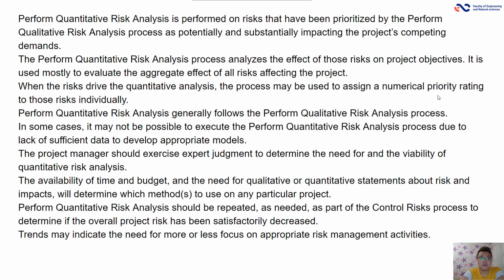The perform quantitative risk analysis process analyzes the effect of those risks on project objectives. It is used mostly to evaluate the aggregate effect of all risks affecting the project. When the risk drives the quantitative analysis, the process may be used to assign a numerical priority rating to those risks individually.